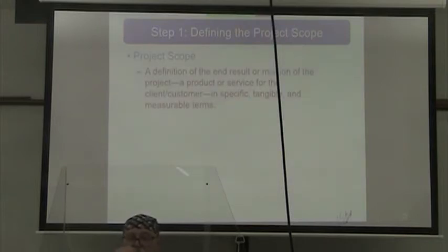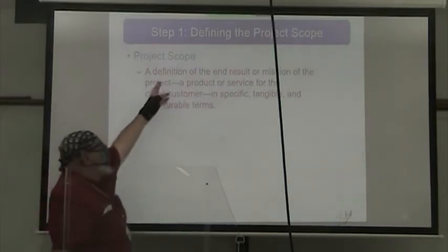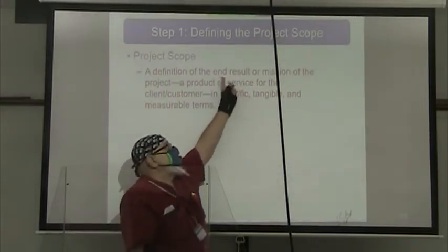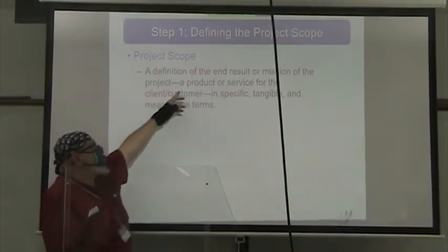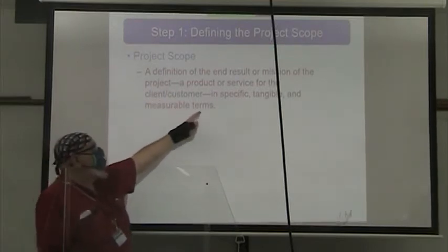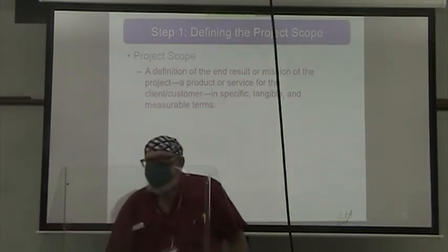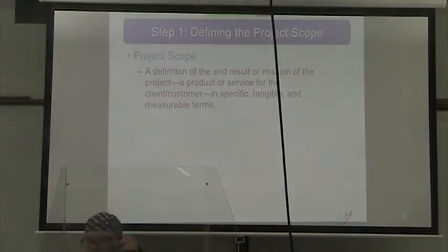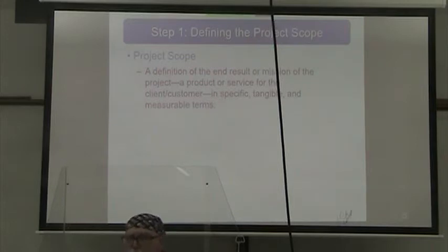When we talk about defining the project, we talk about our project scope — a definition of what is the end result or mission of our project. Is it a product or service for the client or customer? We have to describe that in specific, tangible, and measurable terms. Our project scope can never just say 'we want to make things better.' That's a noble aspiration, but how do we want to make them better?